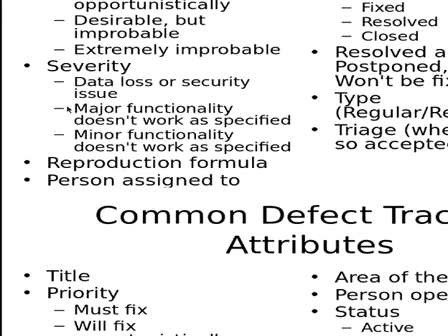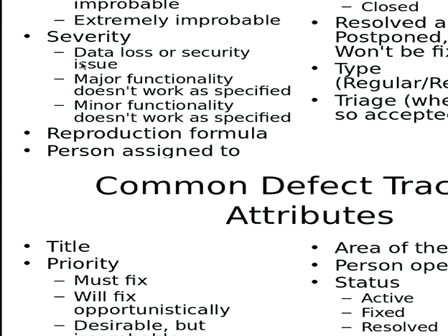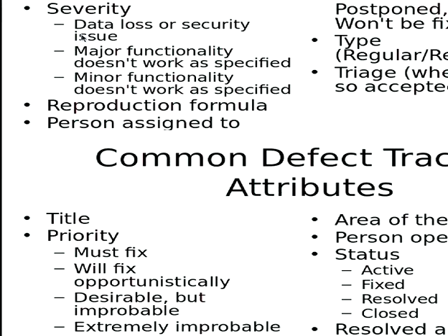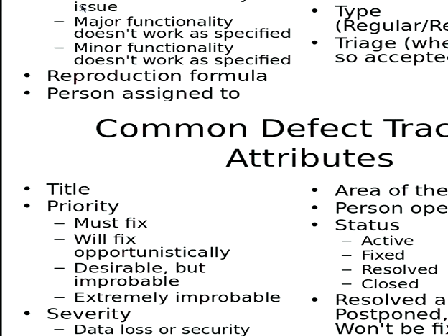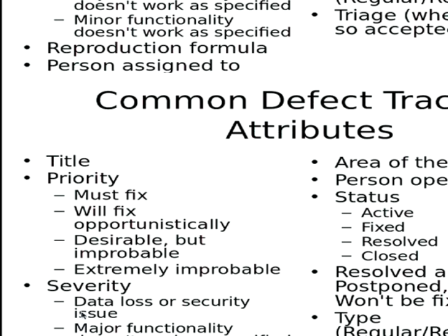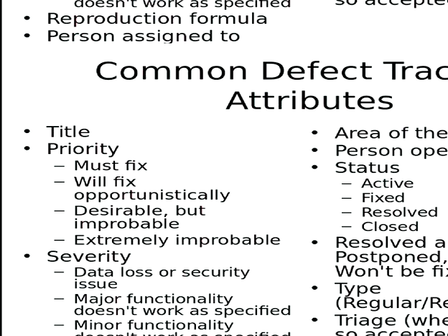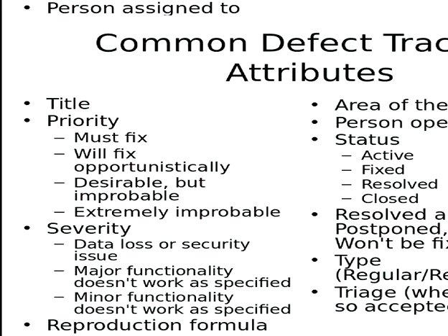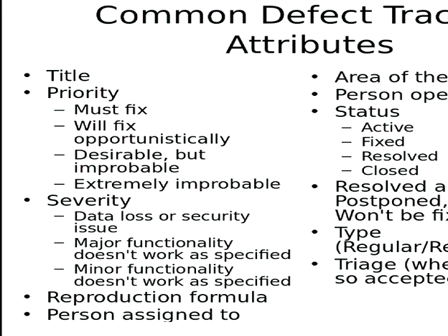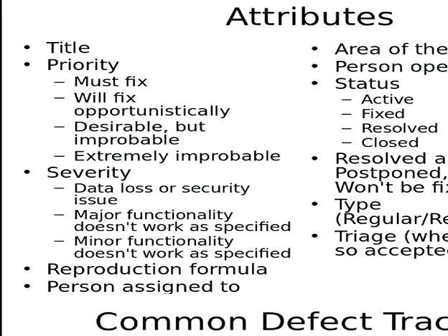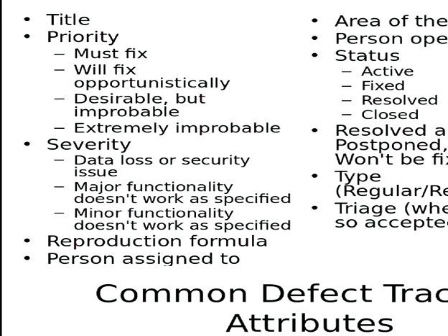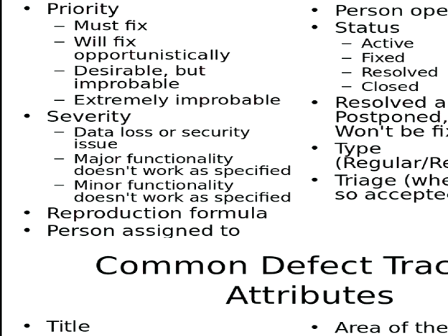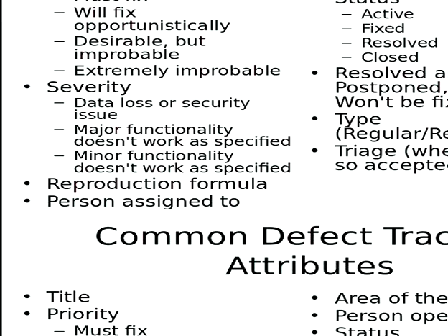Severity has to do with how bad this thing is if it occurs. Conditional on it occurring, how severe is the damage caused by it? Now, a terrible type of bug might cause a crash, right? System fails. Is that the worst thing that can happen? No. What's worse than that? Data corruption, destruction of the data, and